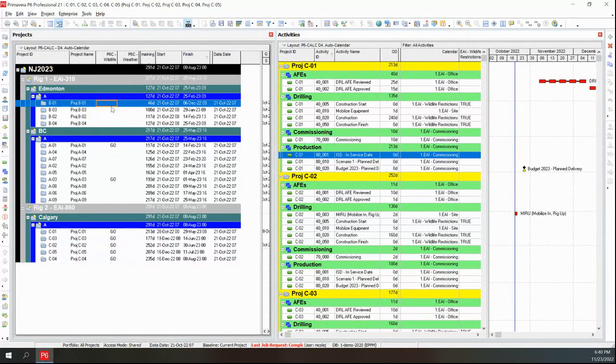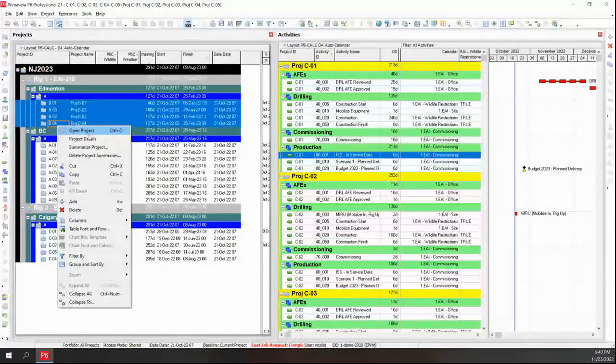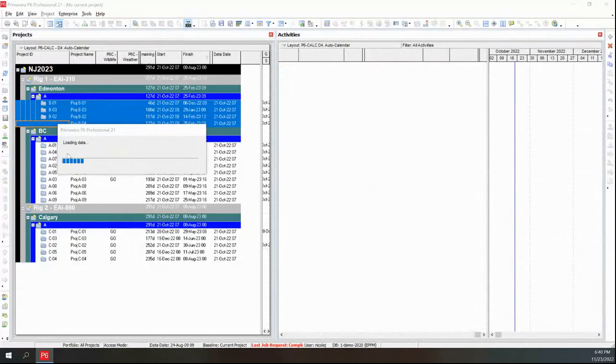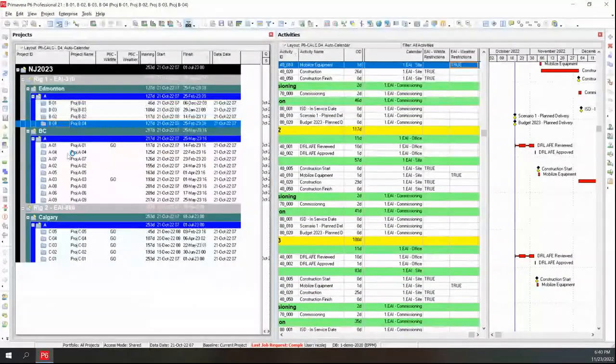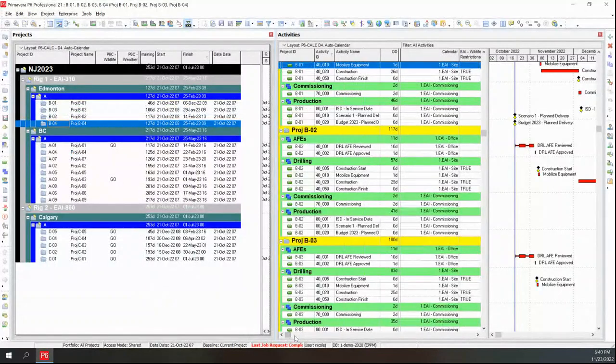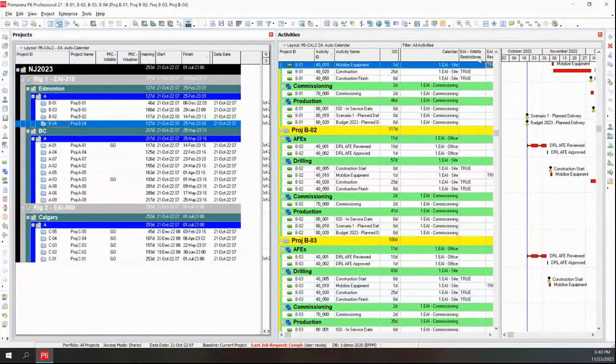So it could be things like caribou or certain owls or bird species, etc., that migrate through the area that you're running your project in, and your team is not allowed to disturb them. So some of your activities may not be allowed to take place at that time. Okay, so I'll go ahead and open these projects and I'll explain the way that you could model this very easily.